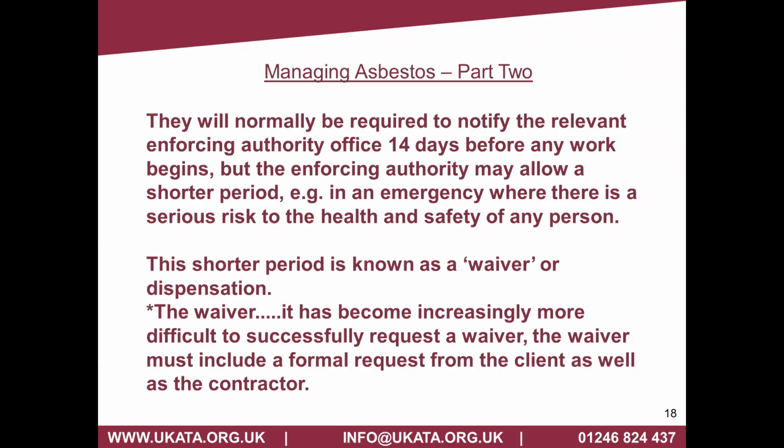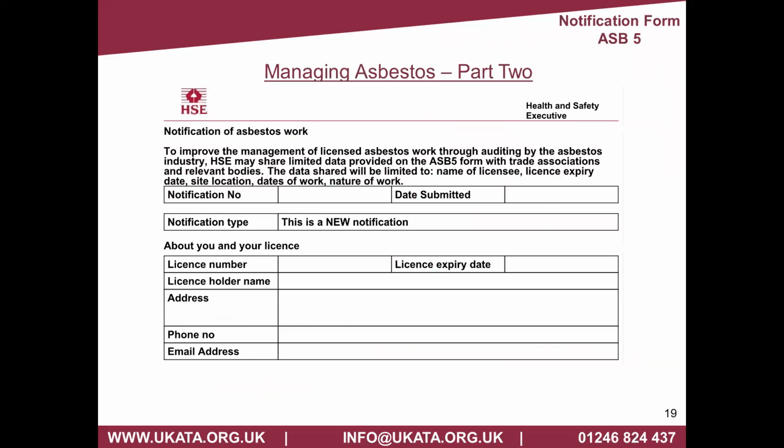If the waiver is requested, in most cases, the client will also have to engage with the HSE to demonstrate why that waiver should be granted. And they do grant waivers. There are occasions where sites can't wait 14 days. So there was always that option, but just bearing one thing in mind, if it was foreseeable that the works could have been prevented damaging or disturbing the asbestos, then in most cases the waiver won't be granted.